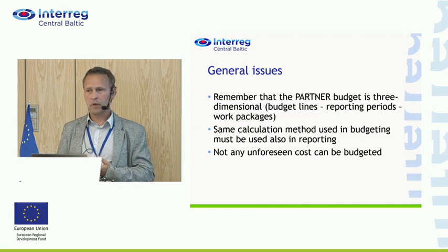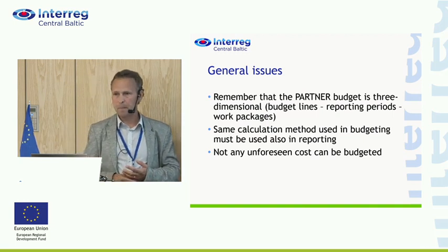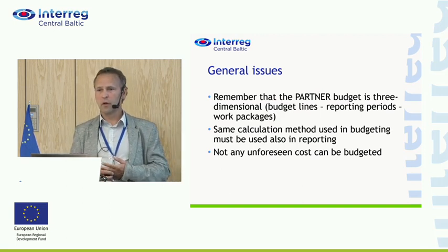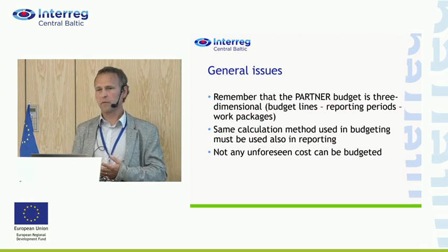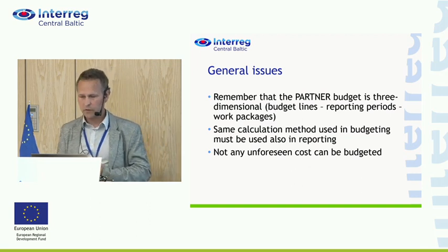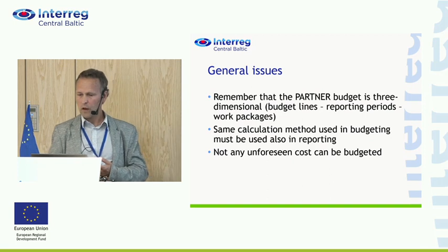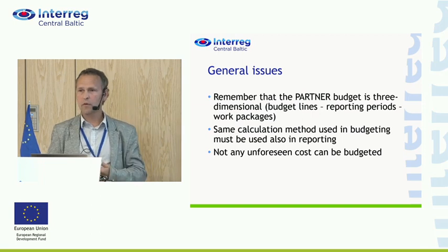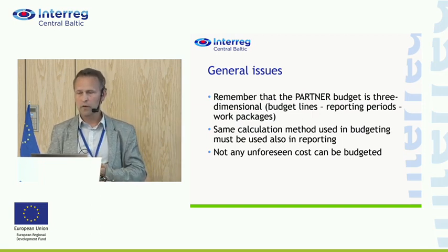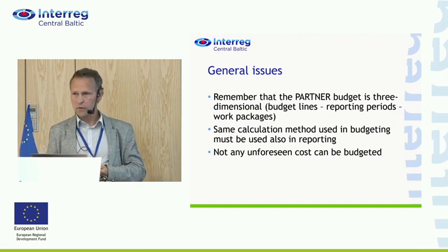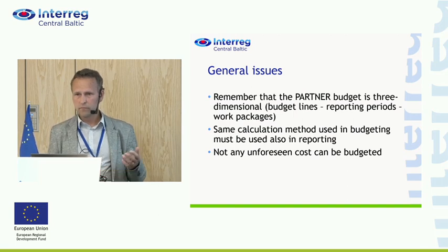As previous speakers also said, EMS is not a planning tool, it's an application and reporting tool. So start from the very beginning with your own system, some Excel or something else that I used to, and plan. Include there all these activities already beforehand, and then try to find the money there according to these activities and according to probably a 2-year, 3-year period.